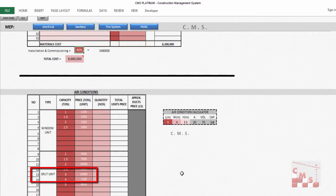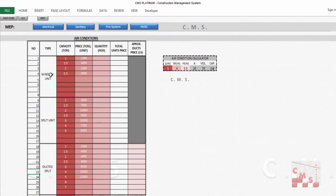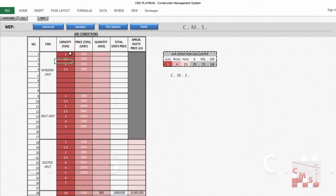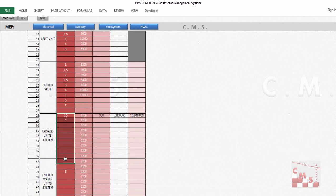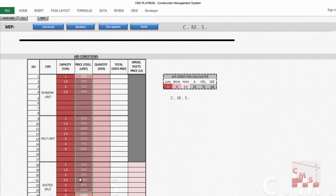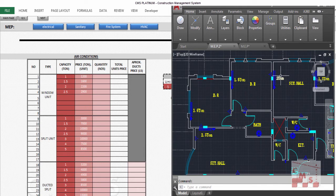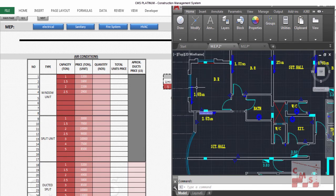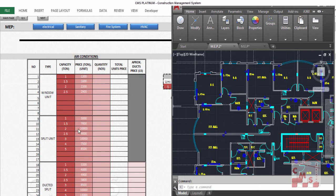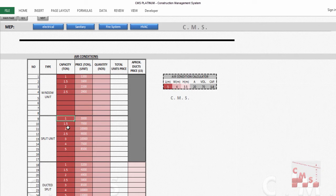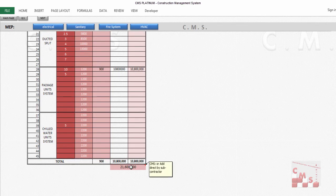For air conditioning / HVAC, CMS shows the common types of AC used in construction. Insert the capacity for each type and the price per ton, then the quantities from the drawings — counting AC units by capacity (e.g., 1.5 ton, 2 ton, 2.5 ton). For split units, insert the numbers directly. There is also an air condition calculator to estimate the required capacity per space. Alternatively, bring the price from a subcontractor and add it directly; CMS will include it in the cost estimation.